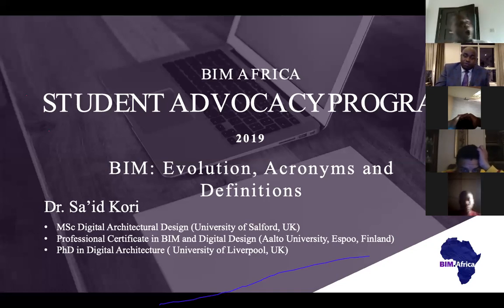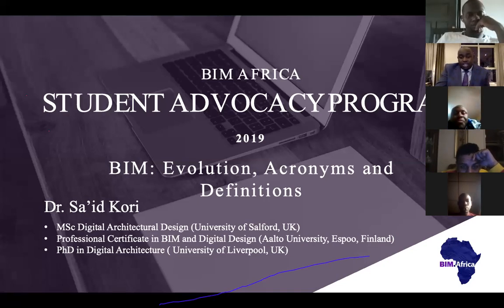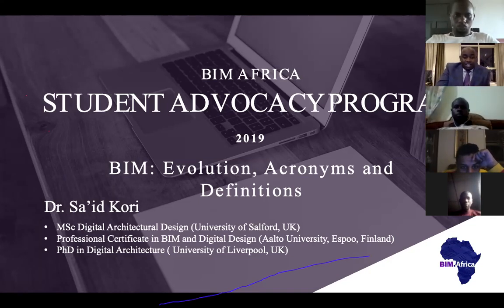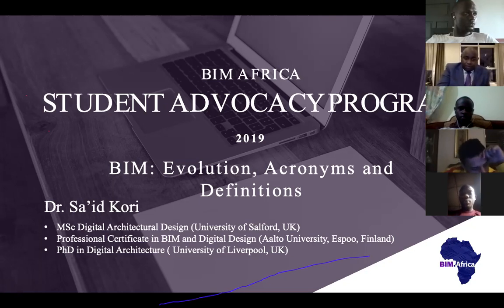So for the standard of data sharing, the BIM standard, there is what we call the BIM execution plan. In the BIM execution plan, all those standards are clearly stated, that certain information need not be passed through to the other. So I think the issue of data sharing is clearly defined in the policy document, which is the BIM execution plan. And at the national level so far, I don't think of any African country, if not South Africa, having any set standard for BIM. So for now, like in Nigeria, we are working under a BIM project manager. As a project manager consultant, then you come as a BIM manager. I don't know, Marwa, whether that answers your question. That's my question, thank you.